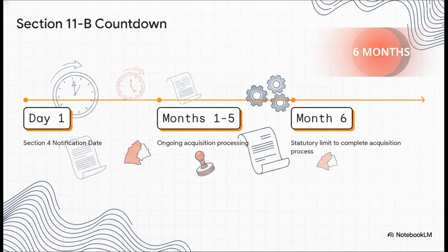Now, all of this is happening against a literal ticking clock. Section 11B mandates a totally rigid 6-month statutory limit. The entire acquisition process must be completed within 6 months from the date of the initial Section 4 notification. It's a completely unforgiving timeline.